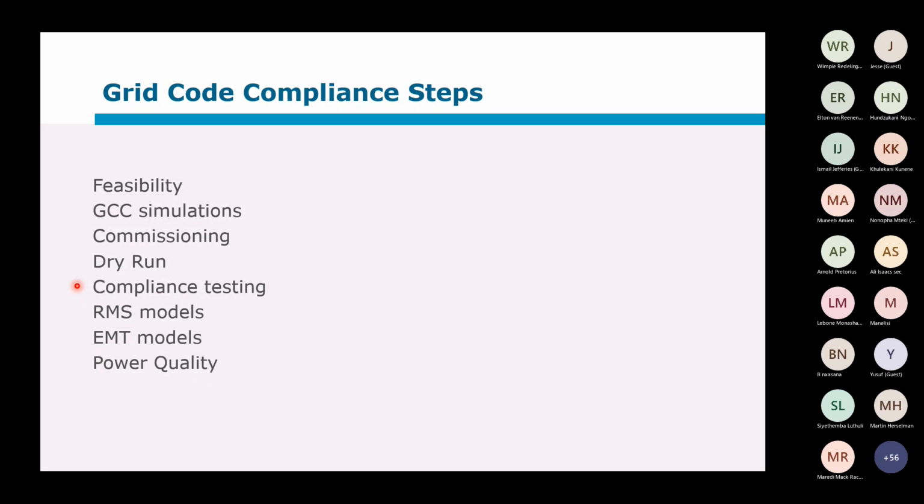That is the one part that we are not sure that RETEC will be able to do. After the compliance testing, you've got your, shall I call it, provisional grid code compliance status, and the plant would be allowed to generate and remain connected to the network.